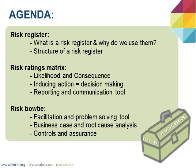Secondly, we're going to have a look at your risk ratings matrix, the primary tool you probably use to prioritize and rank your risks. To do this, we need to have an understanding of what likelihood and consequence means for your risks. We'll also look at how your risk ratings matrix can help induce action and decision-making within your organization, and how it can be used as a reporting and communication tool. Finally, we'll look at one of my favorite tools, the risk bow tie, and how it can be used as both a facilitation and problem-solving tool — including root cause analysis and how to prevent a repeat of a negative incident.